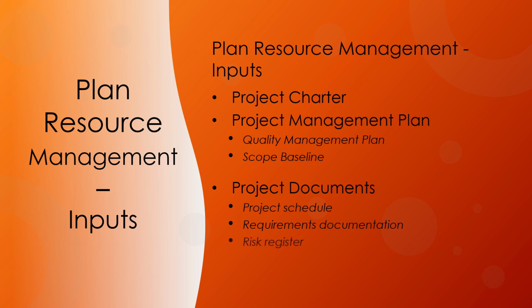The risk register contains information on threats and opportunities that may impact resource planning. The stakeholder register aids in identifying those stakeholders who have a particular interest in or an impact on resources needed for the project. It also helps to identify stakeholders who can influence the use of one kind of resource over another.